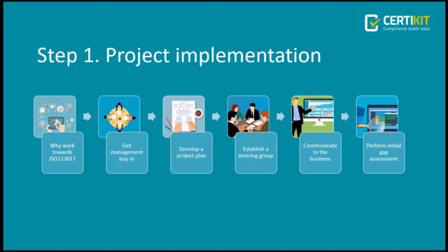So performing an initial gap assessment helps you identify what you have got and what you haven't got. And by doing that, you can then go back to your project plan and refine those steps to say, well, we've got that, we don't need to include that now. We haven't got that, we've got to do that. We've got some of that, so we need to concentrate a bit on that. So your gap assessment is an important step for the whole of the project.